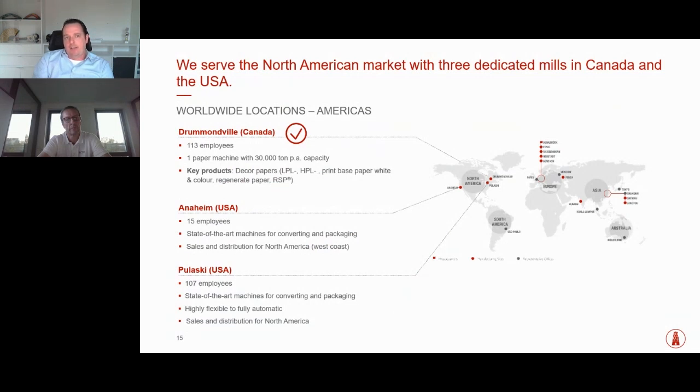How were we able to do that? First of all, we decided that we need to bring the efforts onto more shoulders in North America. We were able to hire 3 new colleagues, and we discussed with our BOE where we can reduce some things, really stopping some things we had done for internal purposes, for example. By that, these 3 major players were part of EASY 70 to 80% of their time. And that is something which has really worked out well from my experience.